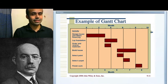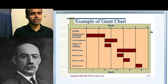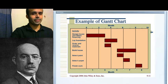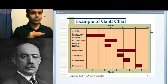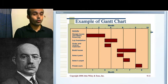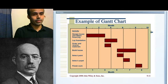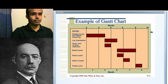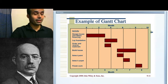When the piling activities are done, building the house starts — meaning the first floor. When the first floor construction has started, then you select paint — because whoever will do the painting for this building, at that time you have to hire them or contact them to come. You have to start arranging the painting because one floor is done. You can select the paint — what it will be and what all the other finishing activities will be.